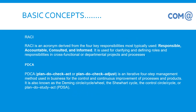The RACI matrix is used for defining roles and responsibilities for any kind of activity. RACI stands for Responsible, Accountable, Consulted, and Informed. Based on the activity a person is performing, we designate whether they are responsible for the activity, accountable for any results, consulted while the activity is being done, or only informed at the start date, end date, or during the activity — otherwise stakeholders are not informed about the activity details.